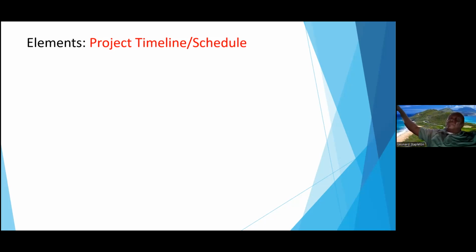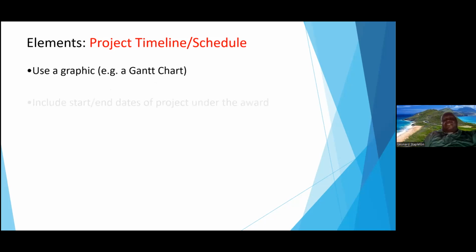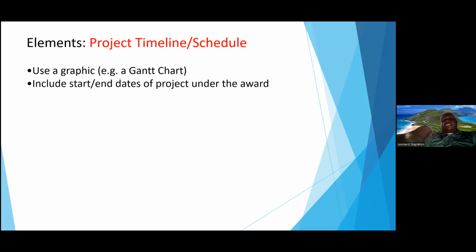and you put the time in days or weeks based on how you're going to break it down. Let's say the purchasing is going to take 1 week, you shade that section. Oh, I think I may be able to show you a chart in this project here.